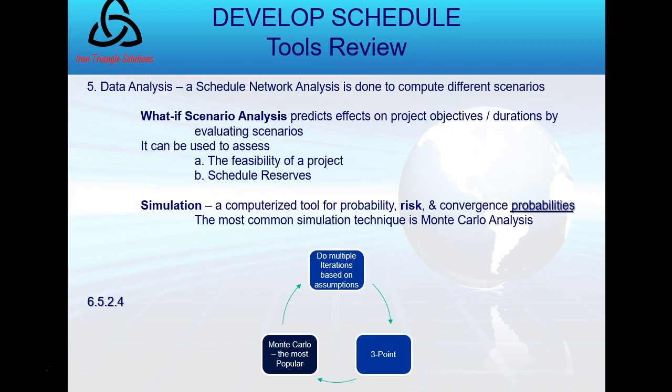All right? You can also use simulation in data analysis. So you do this what-if scenario analysis and simulation. In simulation, you take all your schedule times, all your known risks, all your lessons learned, etc., and you put them into a program called Monte Carlo. And it would spit out for you the probabilities of finishing the project on time or finishing the project at day 75, etc., and the risks that go with it. That's called Monte Carlo analysis.